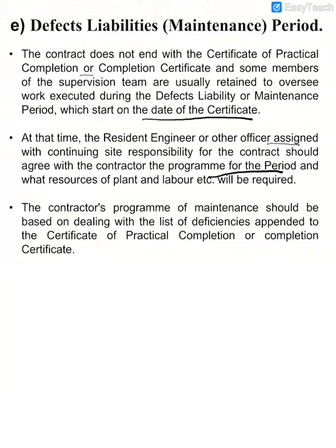Then the contractor's program of maintenance should be based on dealing with the deficiencies appended to the certificate.